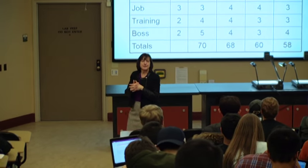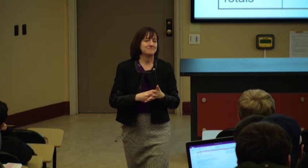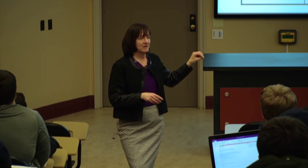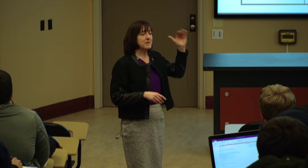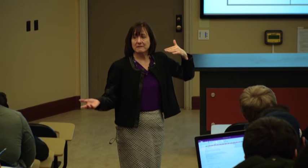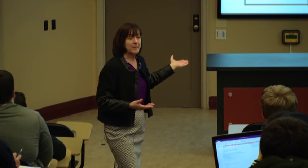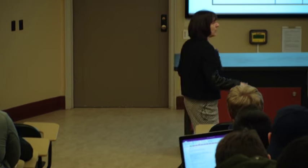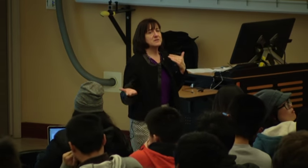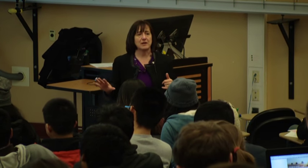Do you definitely just go with Company A? No — how you feel about it is also important, and we don't know that this is accurate enough to say that absolutely is the one. So this can be used to help organize the decision. What you probably can say is that Company D should probably not go further. I would want to get more information about the different companies because it was so close. It's a tool, but it needs to align with your understanding. If there's some aspect it isn't reflecting, you either need to go back and include that criteria in your specifications or get more information.